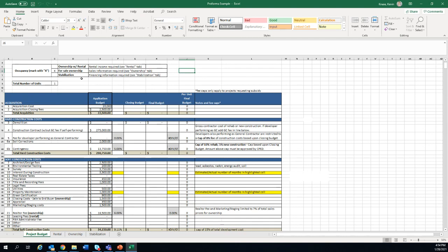And then there's a due diligence period where you're gathering finalized documentation, finalizing those construction plans so they're full architectural drawings. You have to do a bidding process for if you are getting a general contractor or subcontractors.